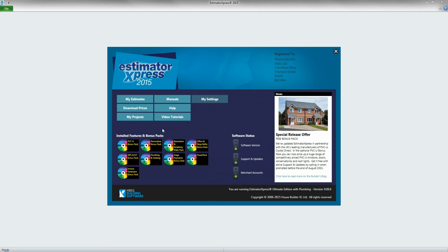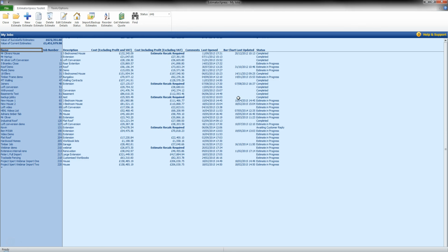In this video I shall be taking you through the creation of an estimate. Now, before starting your estimate, it is generally good practice to click on the Download Prices button to bring down the latest market averages or terms from your preferred supplier. Once done, return to the main menu and click on My Estimates.